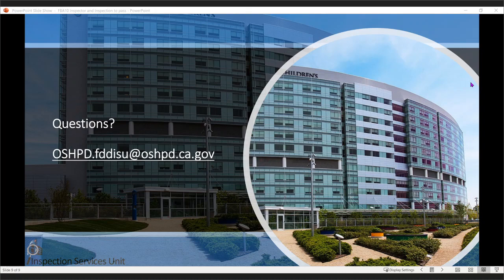This is Bert again. I was at Stanford for the last 9 years building their hospital, a little over 800,000 square feet. We had over 60,000 inspection requests on that particular project. And I think we achieved about 98.5% of them closed on first-time requests.